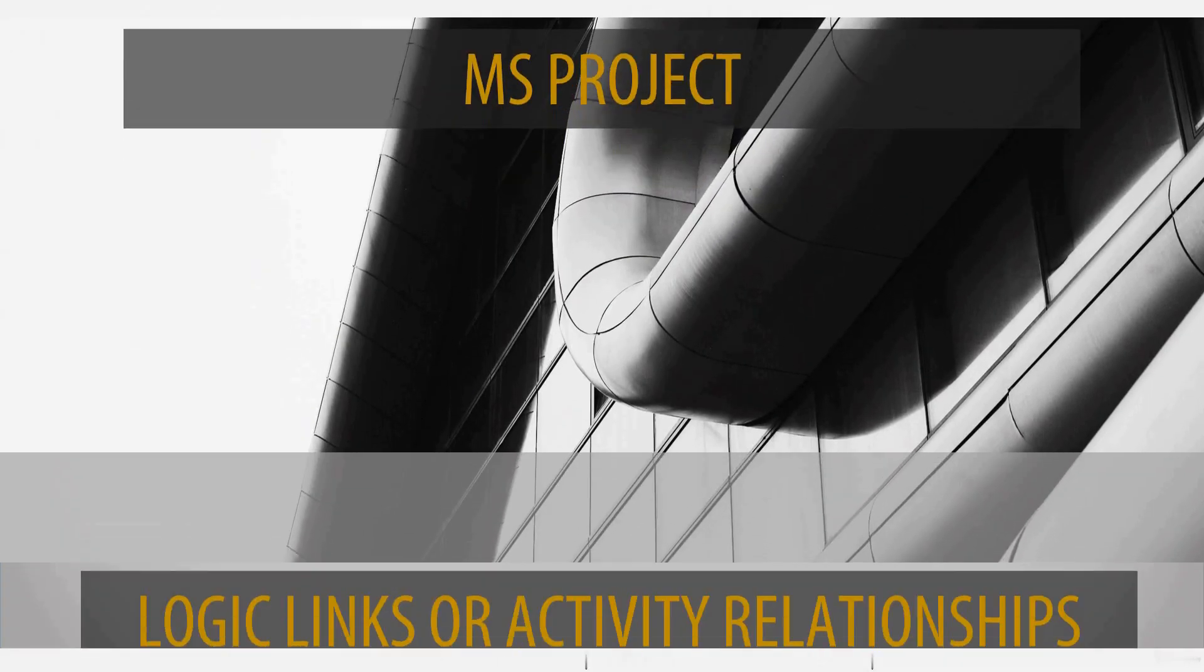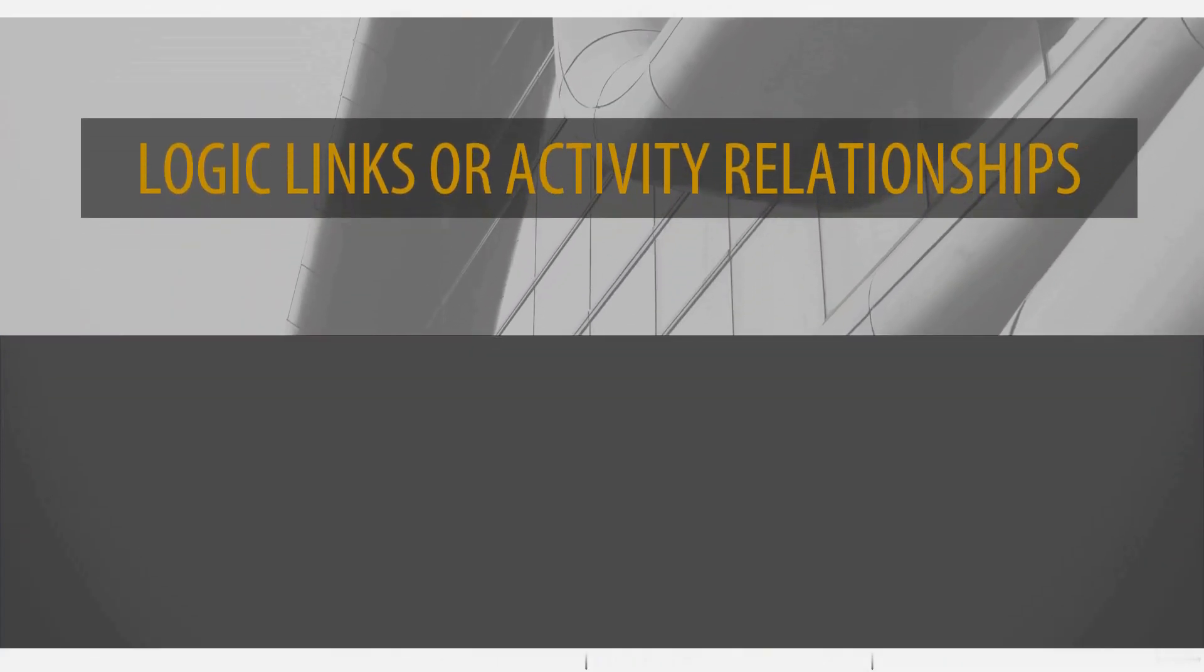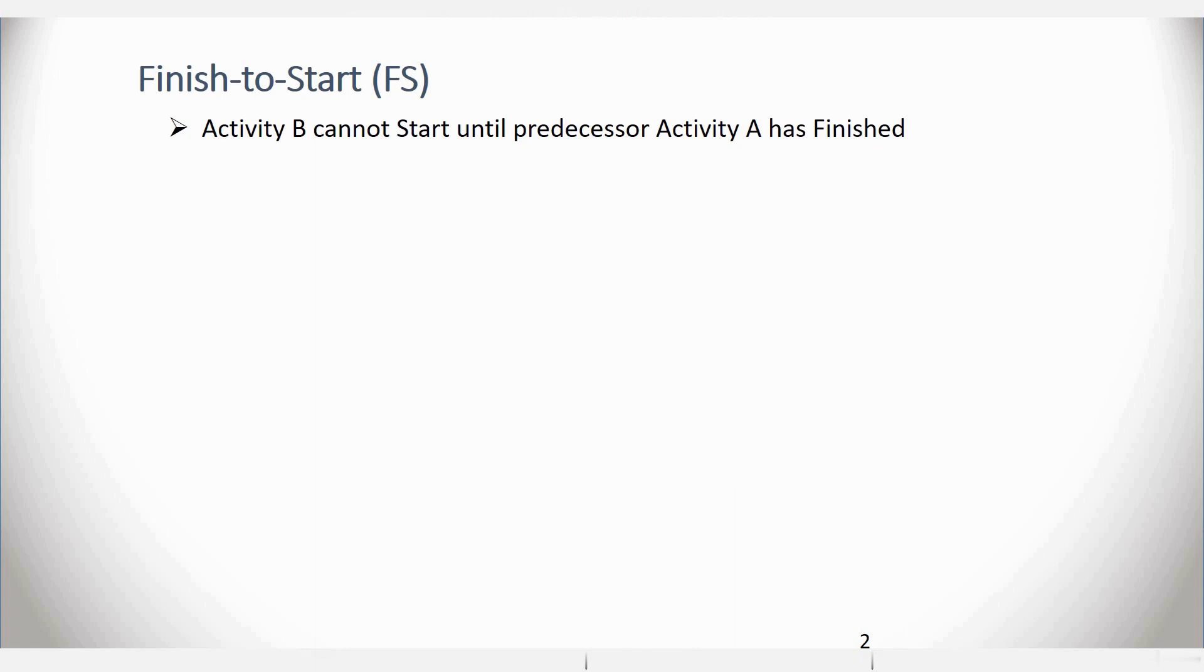Logic Links or Activity Relationships. It is possible to have several types of relationships between activities. The most commonly used is a Finish to Start relationship.